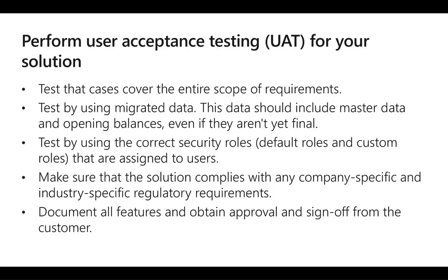This data should include mass data and opening balances, even if they aren't yet final. Test by using the correct security roles, default roles, and custom roles that are assigned to users. Make sure that the solution complies with any company-specific and industry-specific regulatory requirements. Document all features and obtain approval and sign-off from the customer.